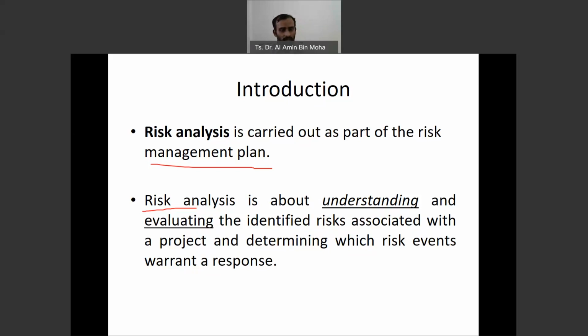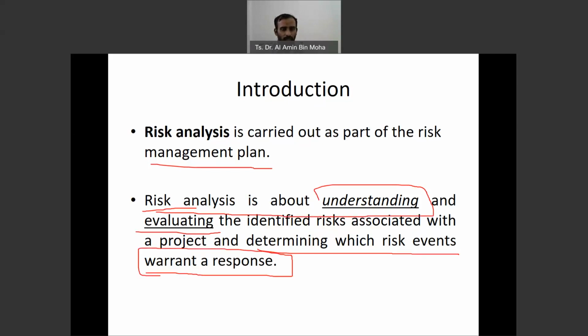So risk analysis is about understanding and evaluating the identified risk associated with the project and determining which risk events warrant a response. You may have hundreds of risk events. If you are going to address all of them, 100, 200, you're not going to do your project. You're just dealing with the risk. So you need to think which risk warrants a response, which is important, which one you need to give focus, which is going to impact your project.